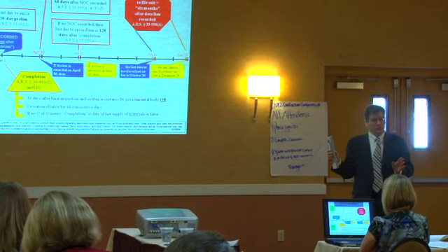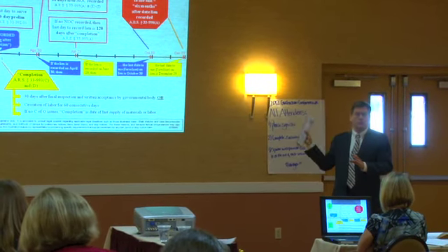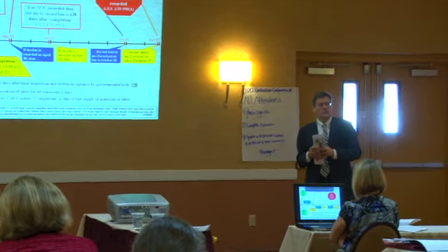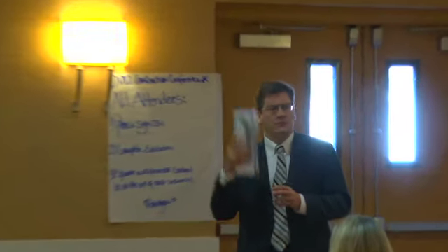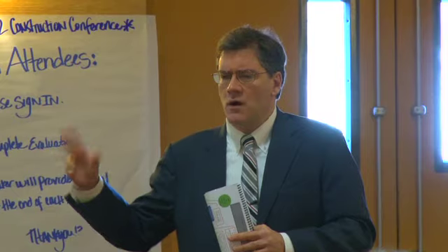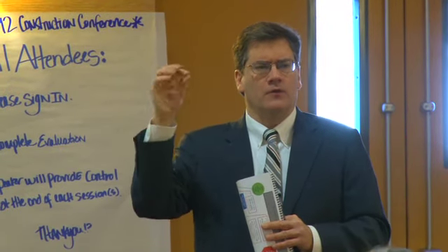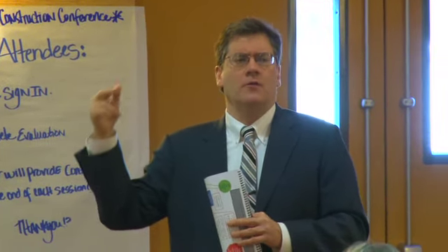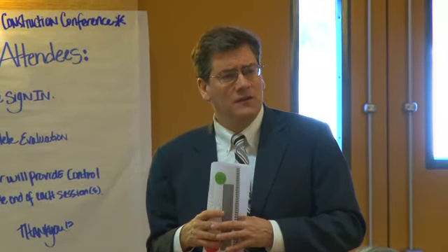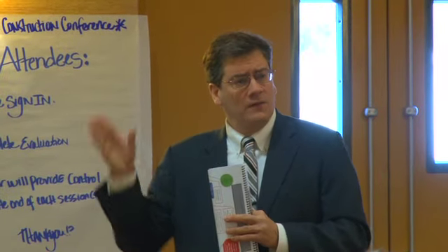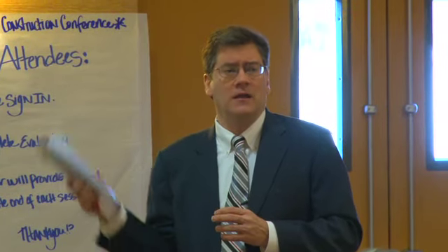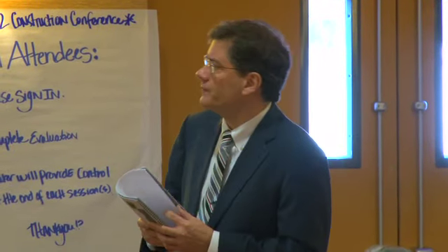Then it's not good against you. If you never got one, you're fine, and you can proceed with your lien claim rights. But you want to make sure that it didn't get mailed to you, because sometimes we find the trickle-up effect takes a little while. It went to somebody in the credit department. It took a while to work its way up to somebody who transfers it over to the lien service company or to the law firm. And you know, out here you've got 60 days, so really 45 if they served it 15 days after. California, it's much tighter because you're working with 90 days and 45-day deadlines.